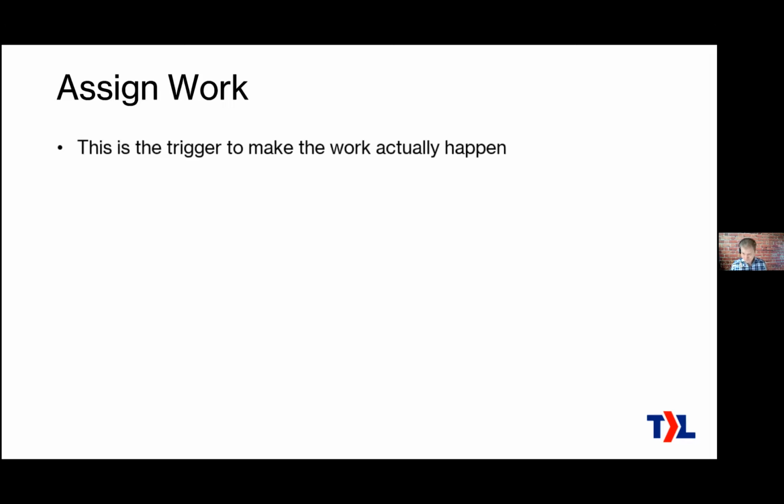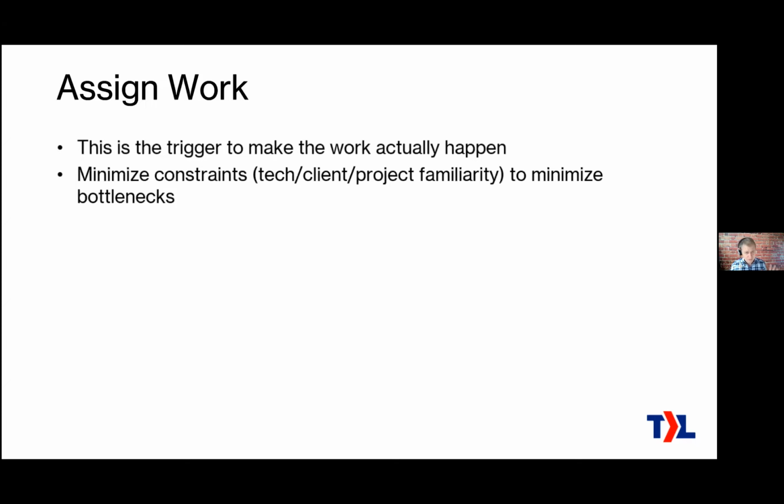Now, we really need to minimize the bottlenecks here. So what do I mean by bottlenecks? A bottleneck is where work gets blocked up because there's some restriction in there. Most commonly on an MSP team like this, it's some members of your team, and most commonly it's your senior members, because a lot of the work depends on them.